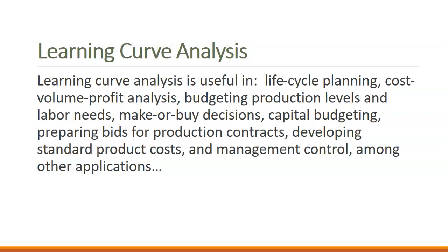If every time a task is repeated, we learn how to do it better, which makes us faster and improves the amount that we can produce in a given 8-hour shift, then the more learning that occurs, the higher our production levels with that same crew.